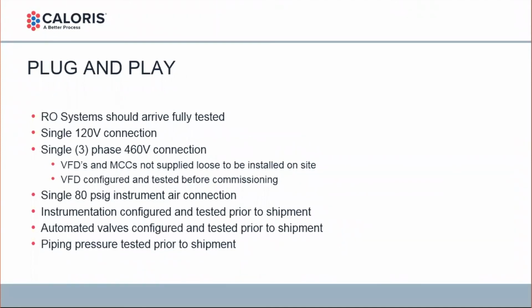Plug and play. Your RO system should arrive fully tested. Caloris's objective is to typically have the system arrive on site, and after everything's plugged in, get the startup done in 1 day. What that requires is a single 120 volt connection and a single 3-phase connection.